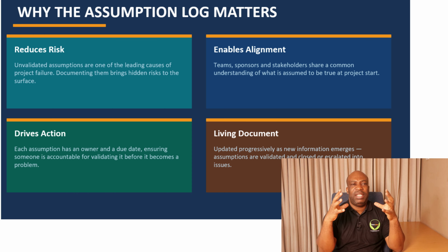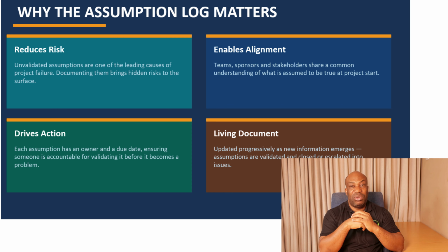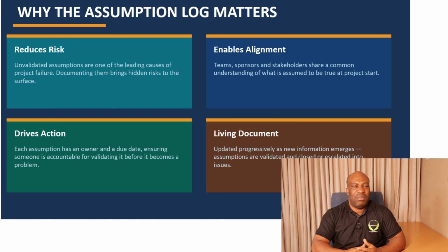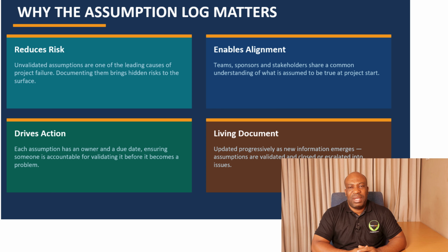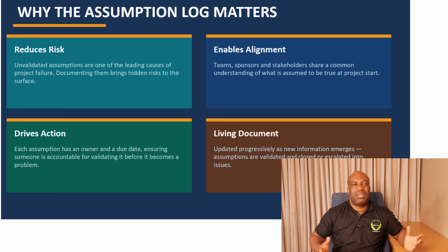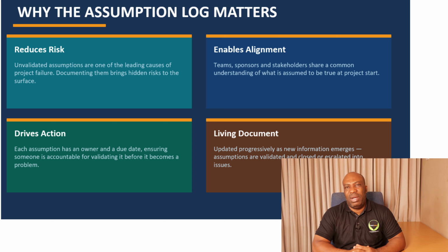Then, especially during the initiation stage, where you're probably creating a project charter, or identifying some stakeholders, it's also very important to use assumptions for alignment, because the organization's senior management or program managers or portfolio managers want to appreciate what was the basis of your estimates, what was the basis of your documentation, what was the basis of your requirements collection, as an example. So the assumption log can also be used for alignment.